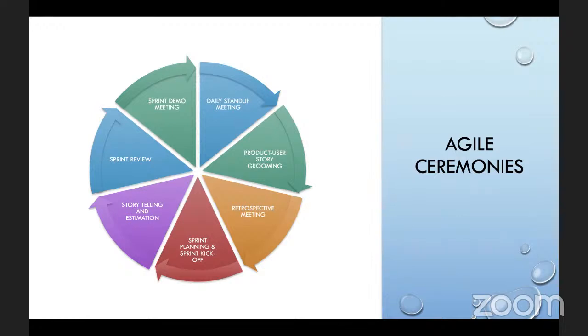So sprint review, the idea is that we focus more on the product, the backlog, what was done, what was not done, right? The sprint review focuses more on the product. Sprint retrospective focuses more on processes, right? Performance, team agility. We want to be able to look at our team performance, look at our team processes, and then change certain processes, etc. So that's the key difference between sprint review and sprint retrospective, right? All right. Thank you very much.